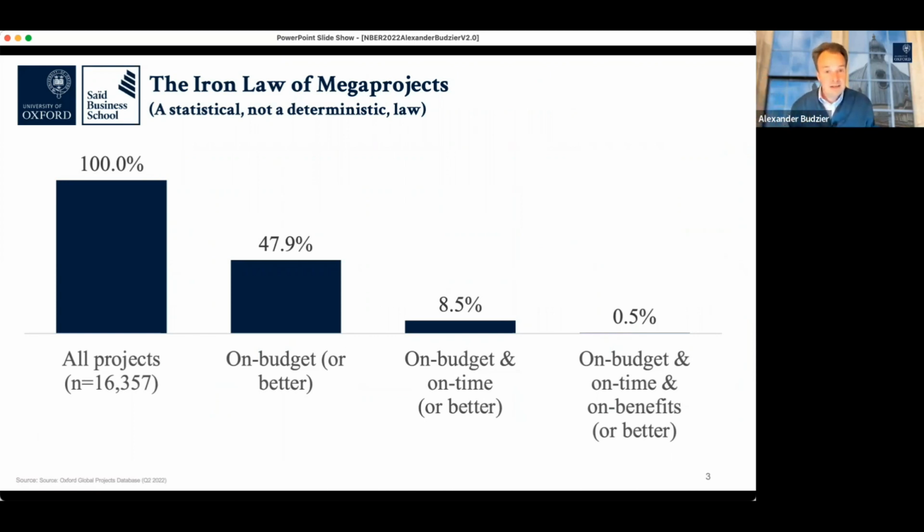And if we're asking the question, you might say, even in road, even in rail, 40% over here, 40% under there, happens in 60% of the cases, 70% of the cases. If you look across the board, how good are we at making these promises when it comes to the investment decision? We see here that about 1 in 2 of those decisions then deliver against the promised cost estimate. So half of the projects are delivering on budget or better.